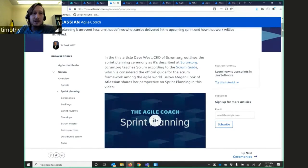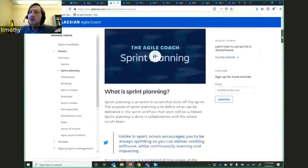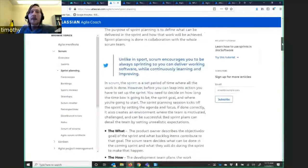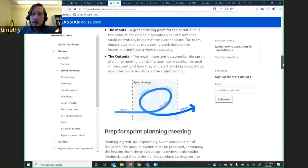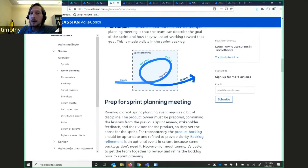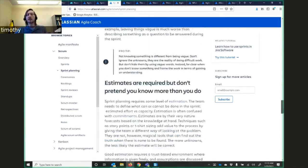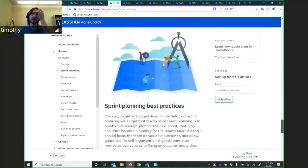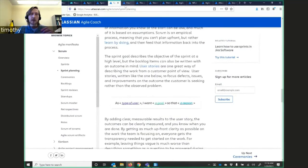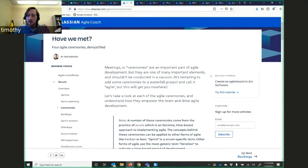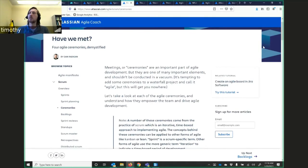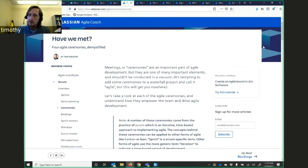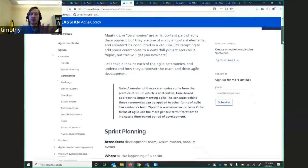As you get into these, sprint planning, you can look through each one of these a little bit more in depth, but this is exactly what it sounds like. Down here, we have an illustration of the sprint planning. There are inputs into it. You need to address the who, the how, and the what, and then you need to set outputs for this planning meeting. You can go through and read this in more detail. I'm not going to go through all these in high levels of detail. Meetings or ceremonies, as they're calling them. Meetings, if they are done correctly, are a benefit to an organization. If they are done incorrectly, they are a major time sink and of minimal reward. So when you're running a project, make sure that when you have a meeting, there is benefit to the meeting and that you are just not having a meeting to meet.